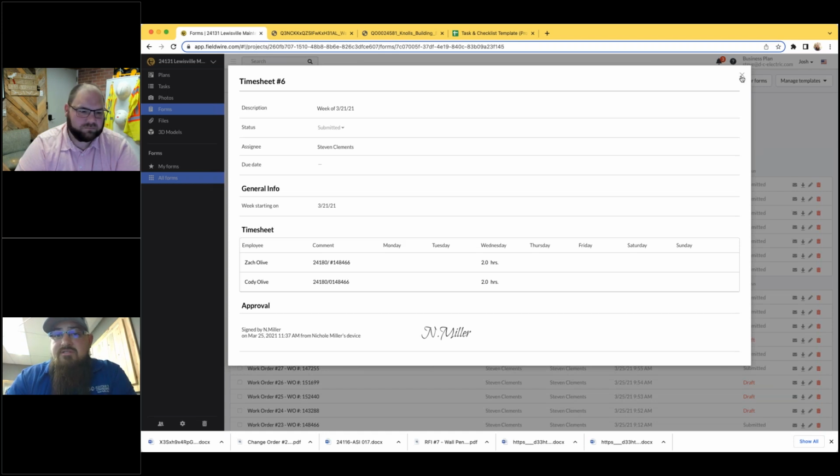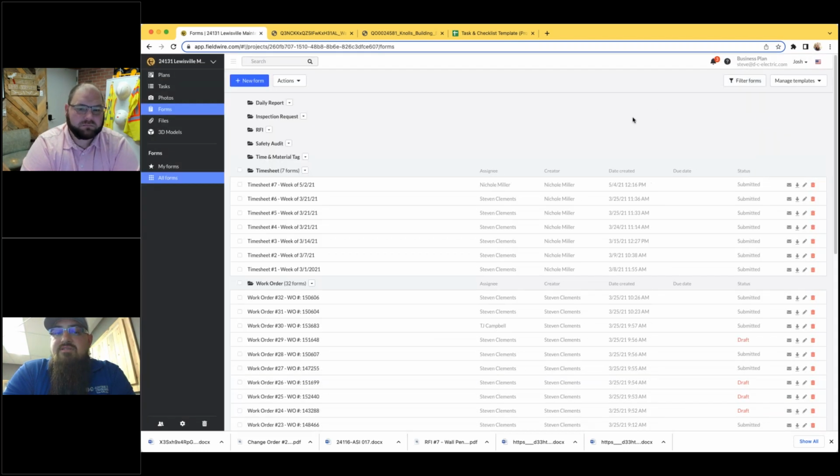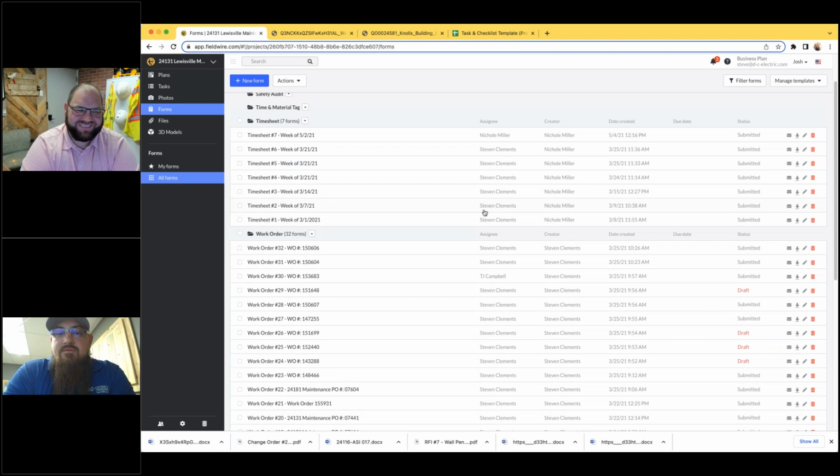But for billing purposes back at the office, they know that although their time was under 24180, it attached to work order number 14866. And so it creates a streamlined billing process. And then for payroll, it goes right into QuickBooks as well. So it makes it so everything's clear and we're catching everything and not missing some of these minor things that don't always get communicated. Sometimes the communication stops on a hectic project, and this helps clarify things.